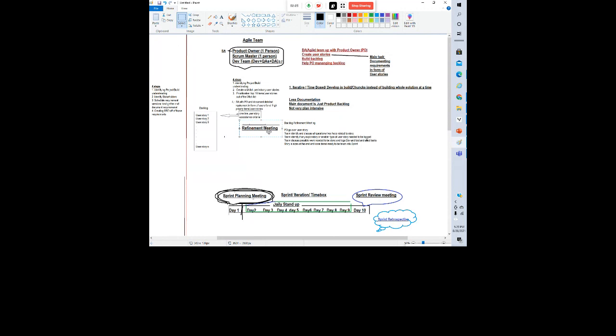This meeting happens after you have a backlog of the 10 most important stories defined, meaning each story has acceptance criteria.